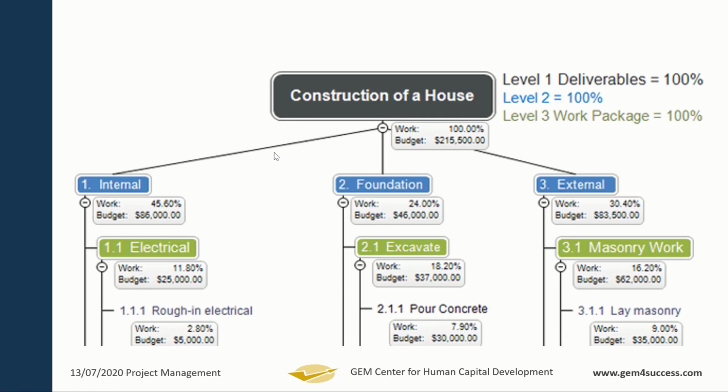So this is another example of your WBS. In this case now, you can see some element of costs has been introduced. So when you are doing the budgeting of your project, you come back to your WBS and you estimate costs from the work package level, and then from there you can aggregate to the top to be able to have the budget of the project.